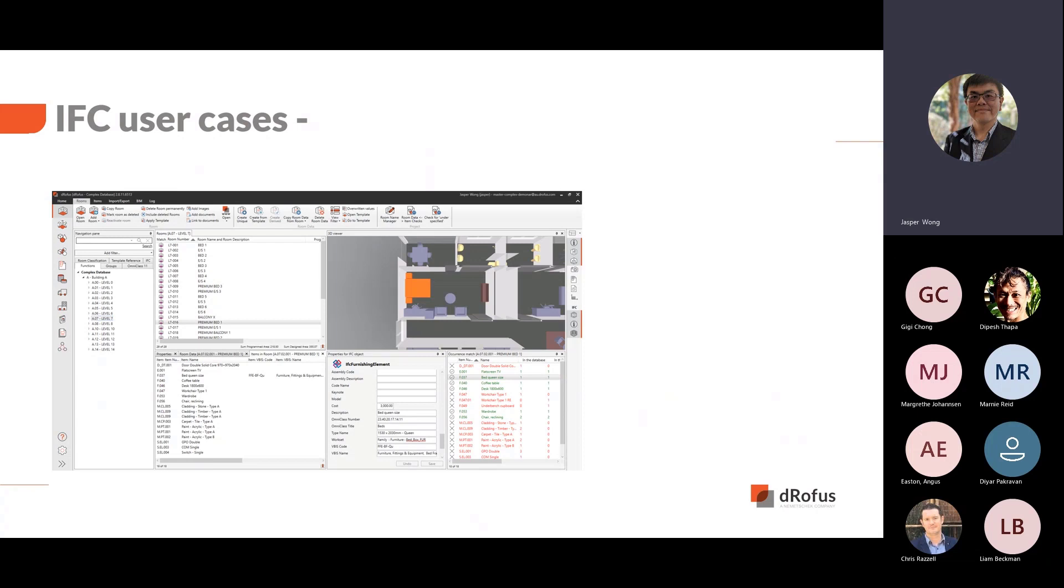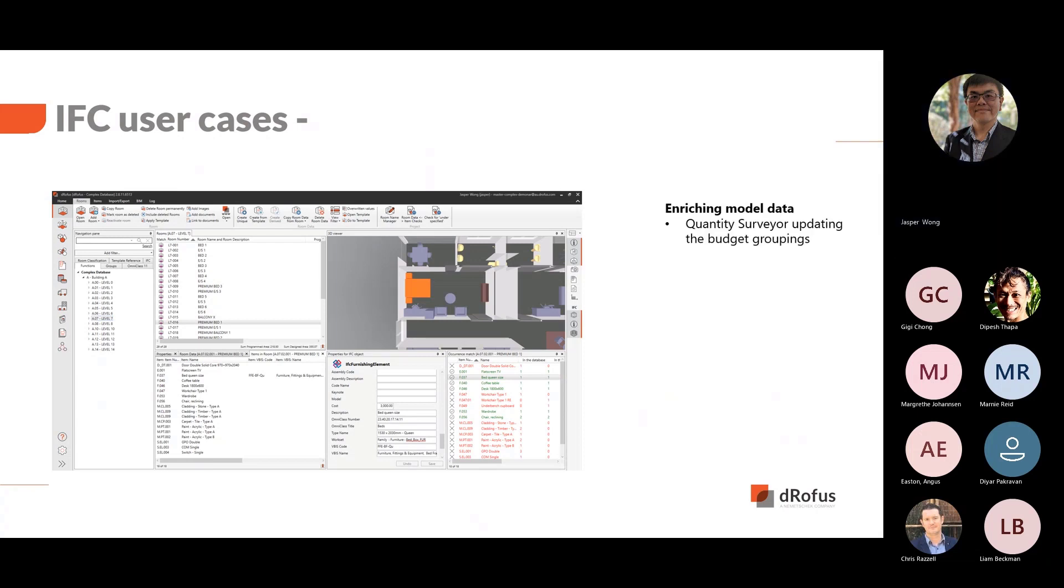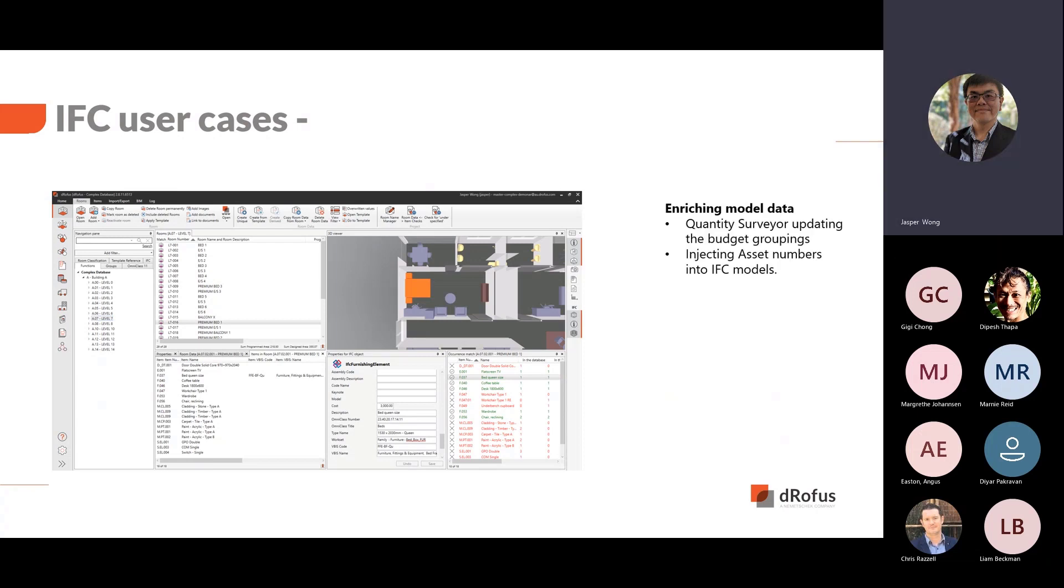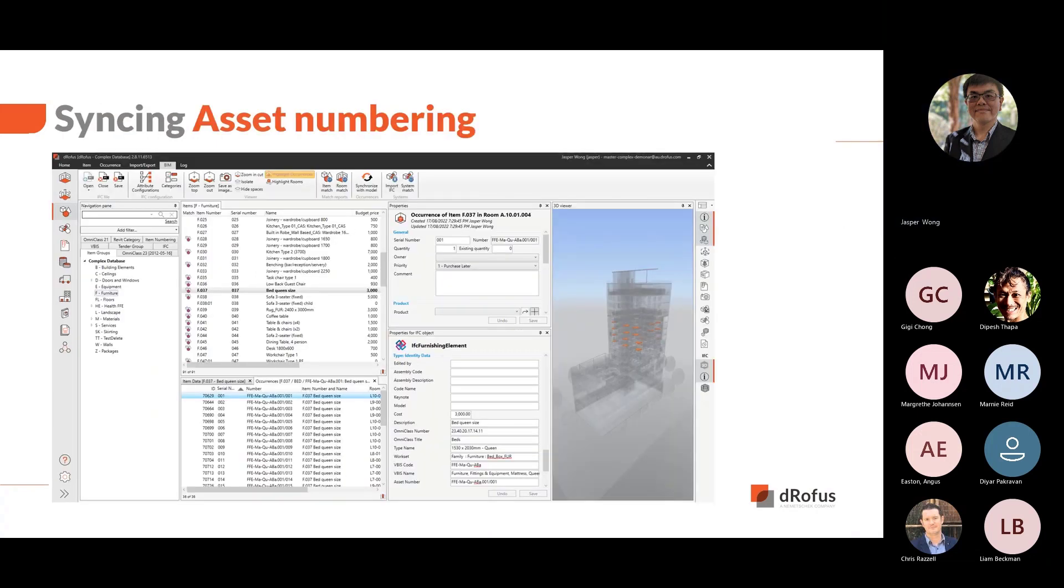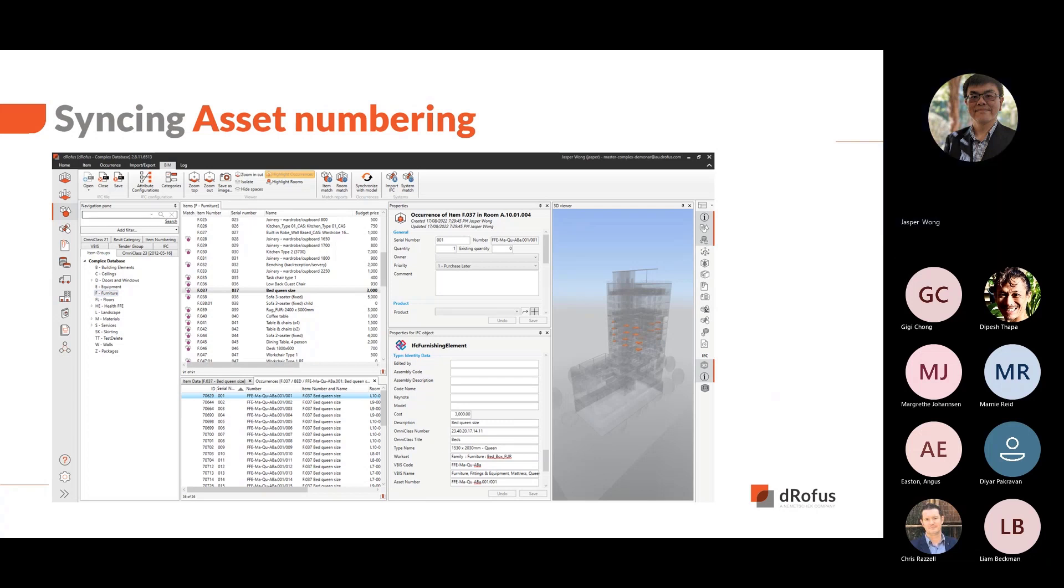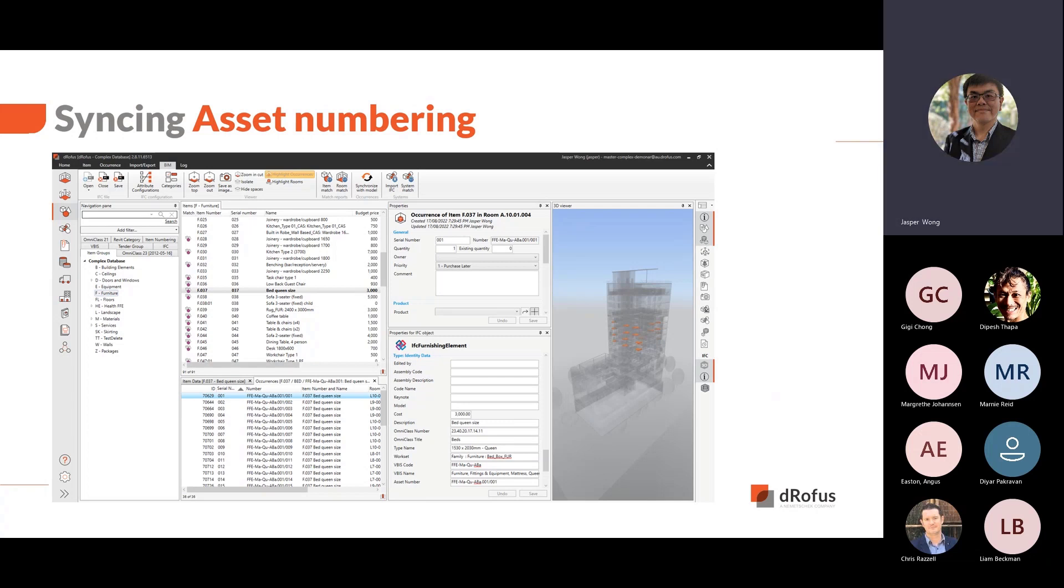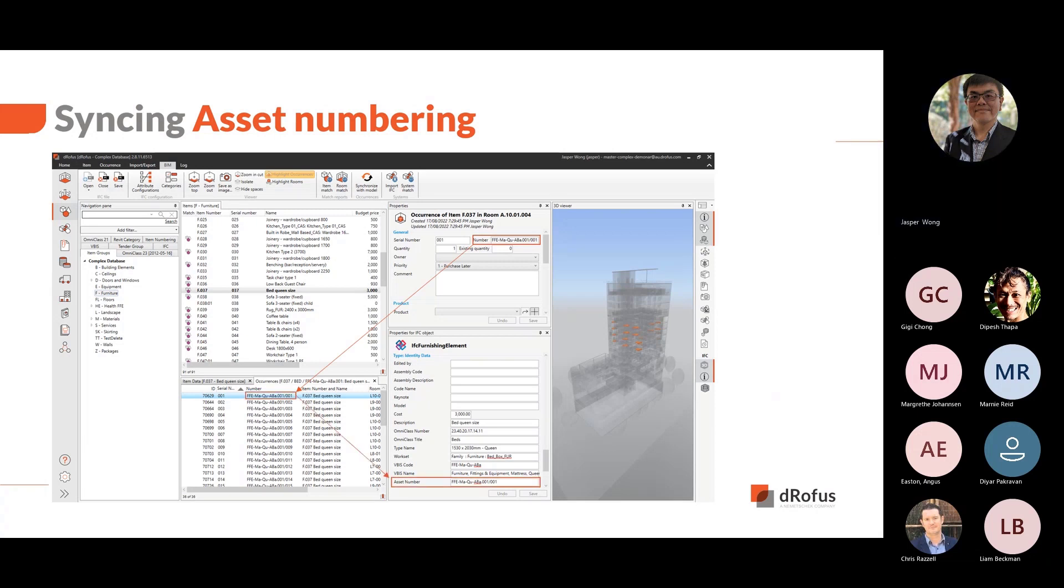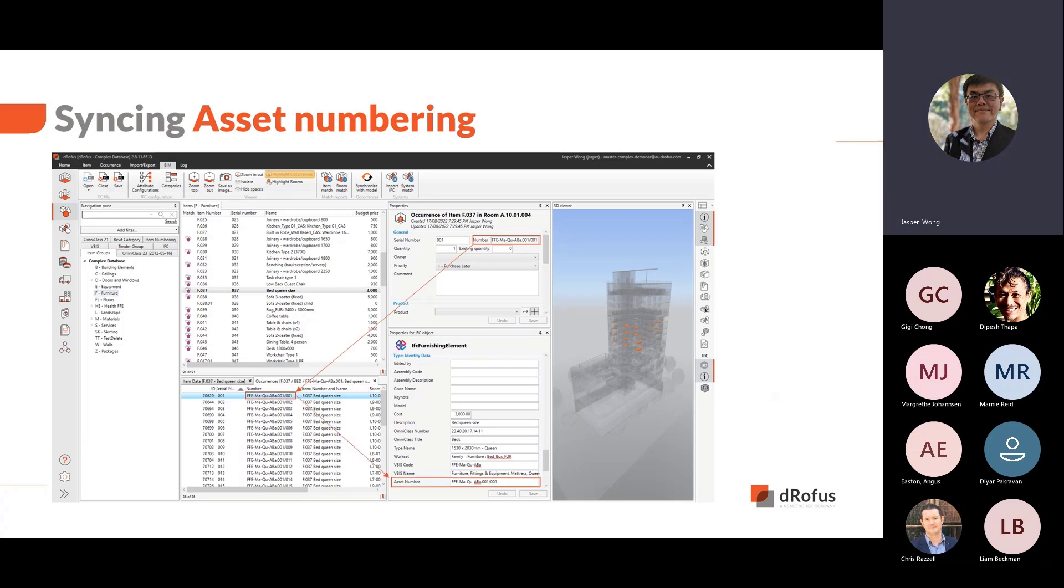The workflow we just showed has a few use cases. For example, a quantity surveyor can update budget groupings in their version of the IFC models before receiving newer IFC versions. We can also inject asset numbers into IFC models, which we will demonstrate next. At the handover stage, one of the activities is to create unique asset numbering for various elements. We have developed an asset numbering system in DROFUS that can be synchronized to IFC model. We will explain how to create a number with VBIS codes and insert the number into the model.